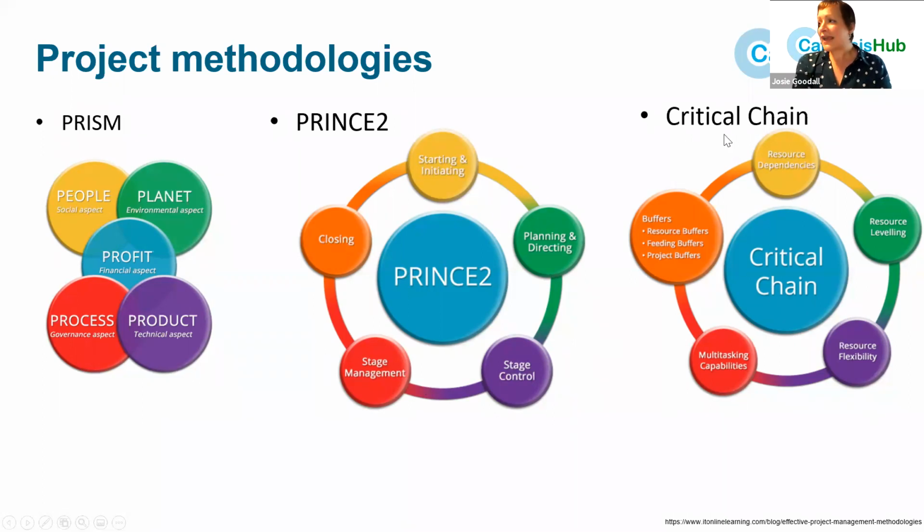The critical chain uses something like the project evaluation review technique to decide on the critical path of projects, which tasks are completely critical and which are secondary, and it allocates the resources as quickly as possible to those critical tasks while ensuring there are resources available for the other tasks involved. So you're looking at what tasks are dependent on what resources and assigning them appropriately.